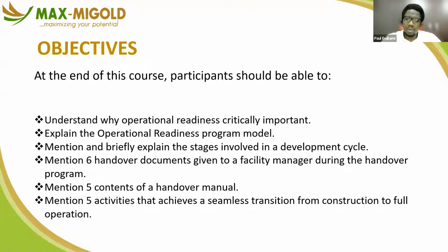And then handover itself is not what we think it is. It's not posing for a picture in front of the building and exchanging keys or cutting ribbons like we do as handover. Handover is an entire process that involves documentation. You document the entire building, the entire process of building, the entire outcome from that process, and that is what we call handover. It is the process of handing that over. We say we are handing over the facility to the facility manager. You don't need keys as handover tools. You don't need picture poses or cutting of ribbons.